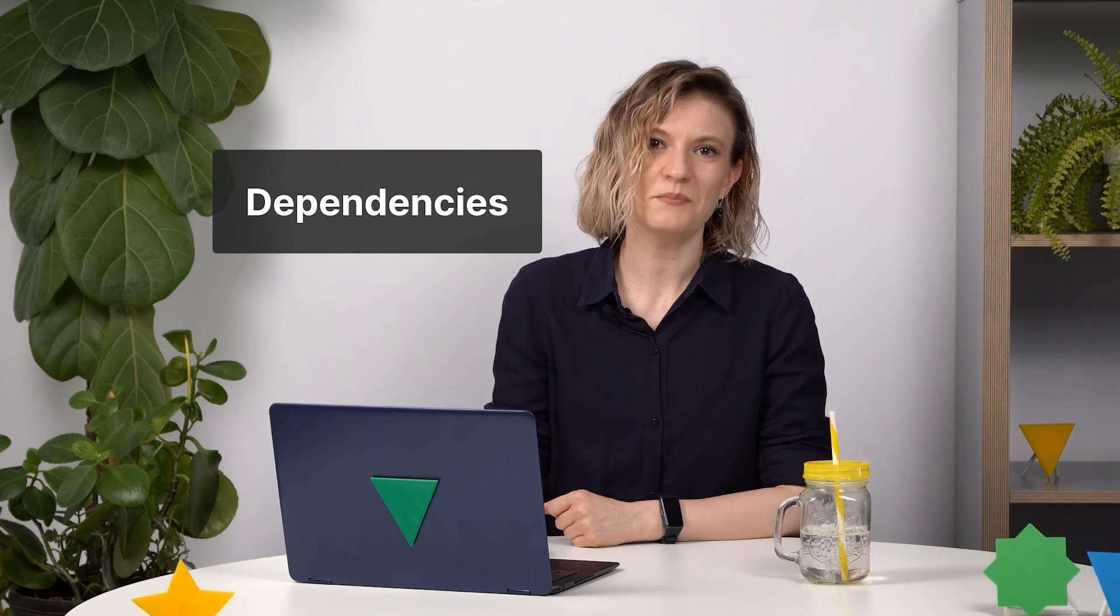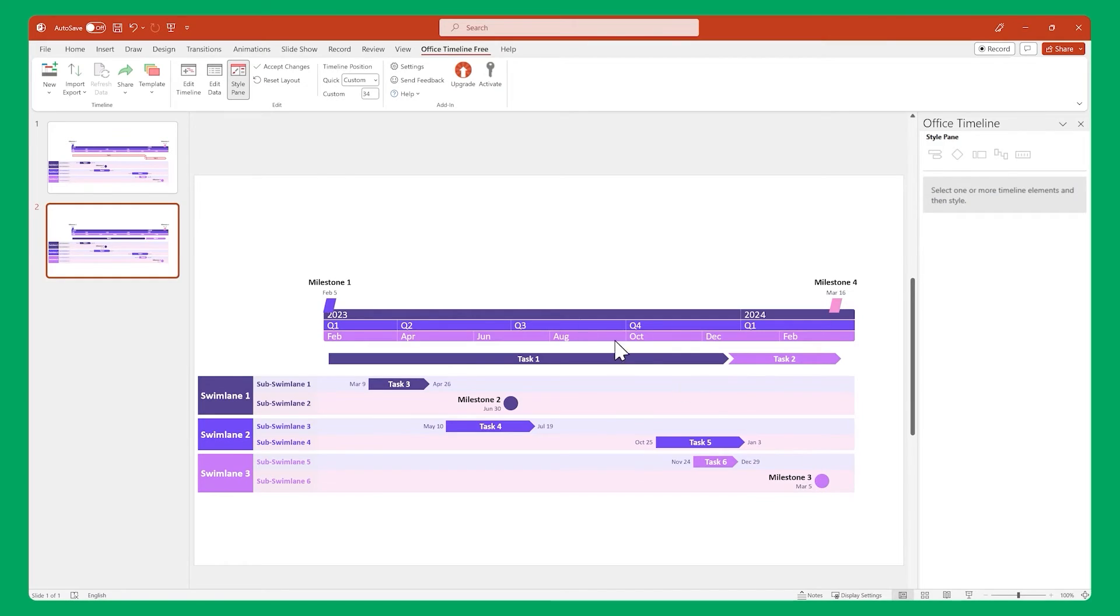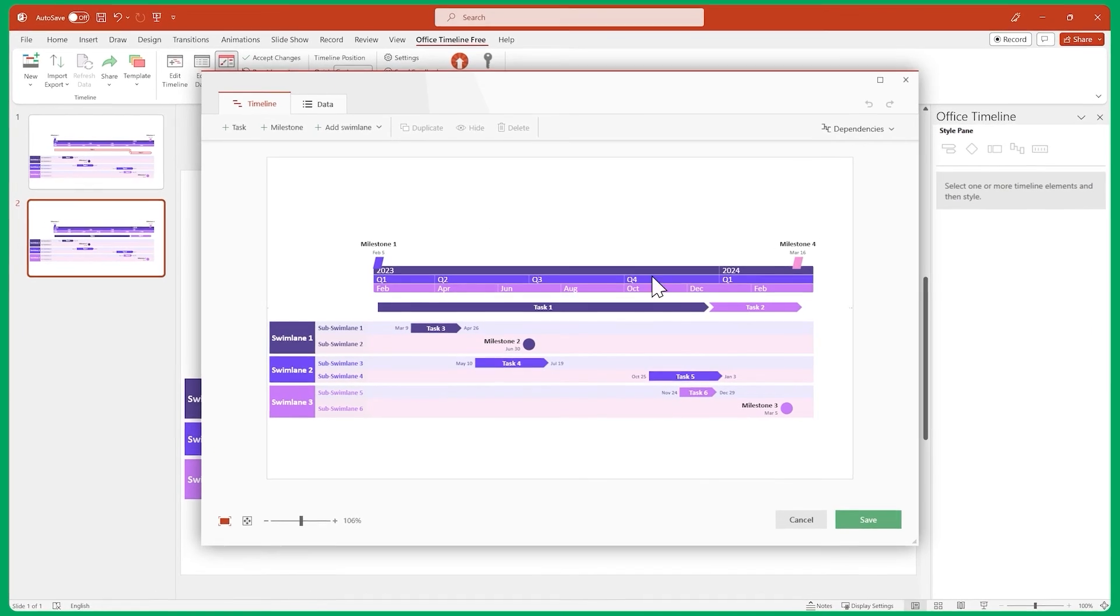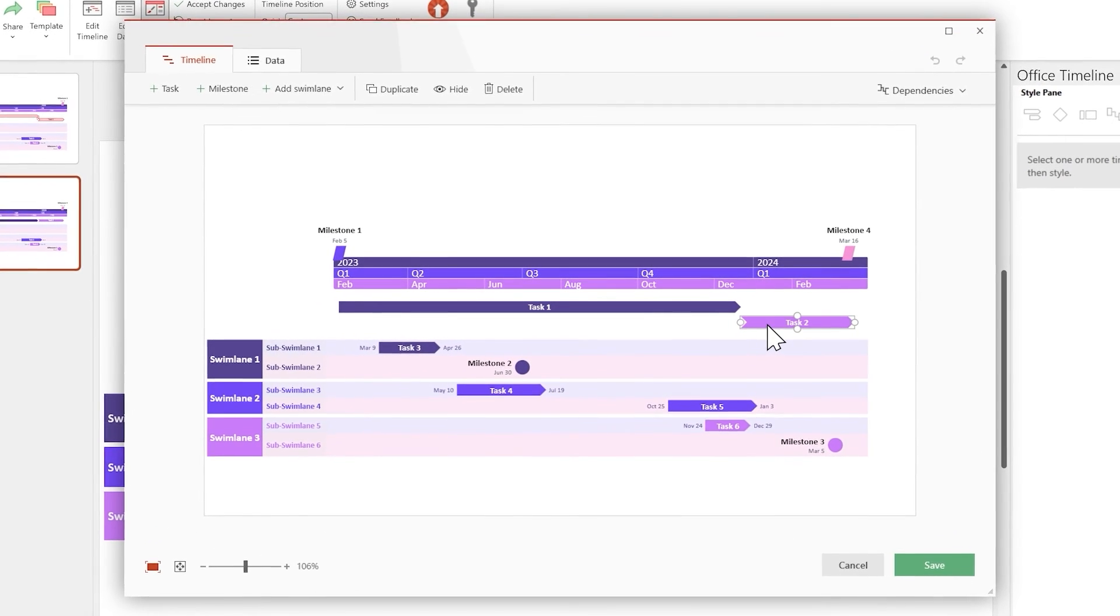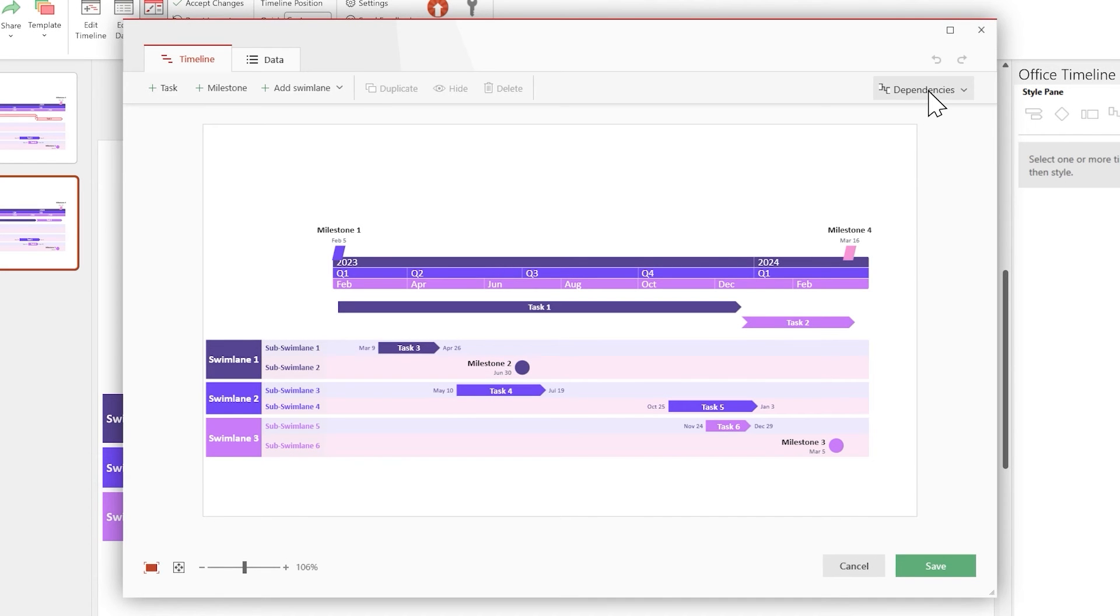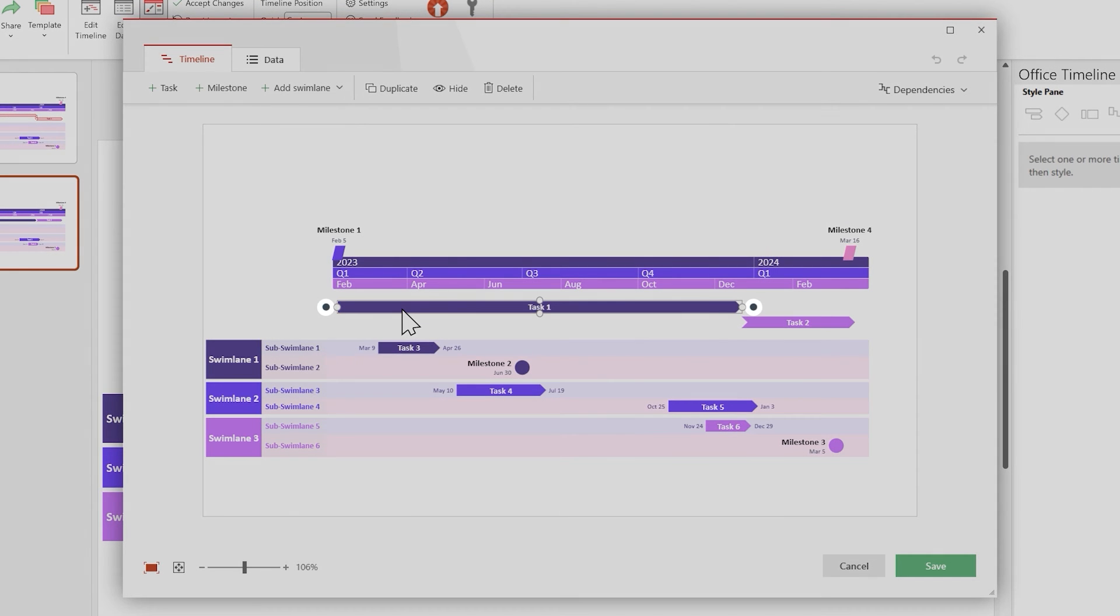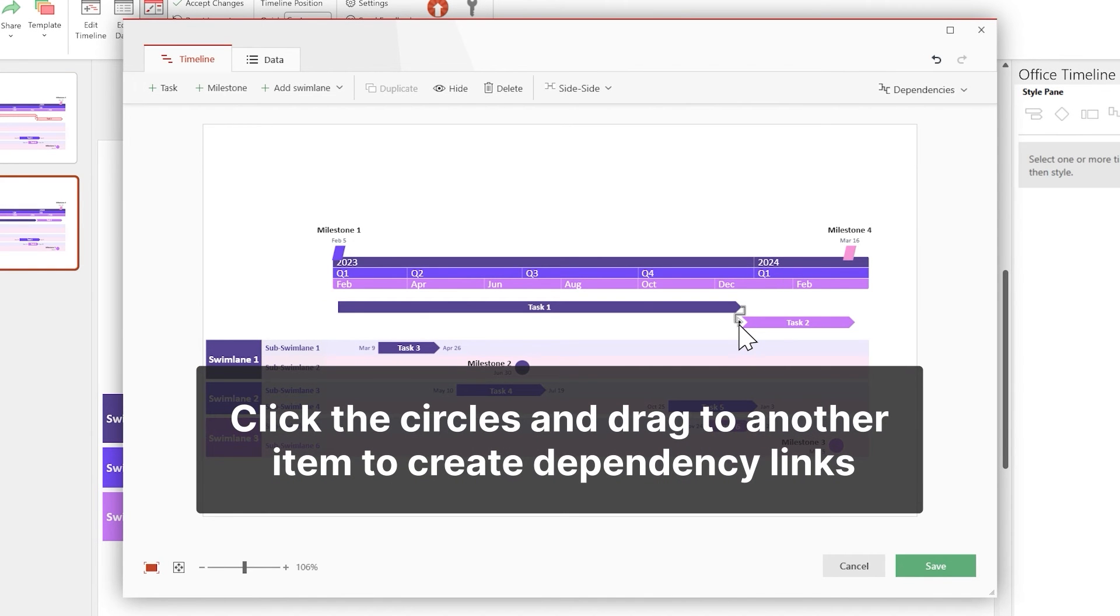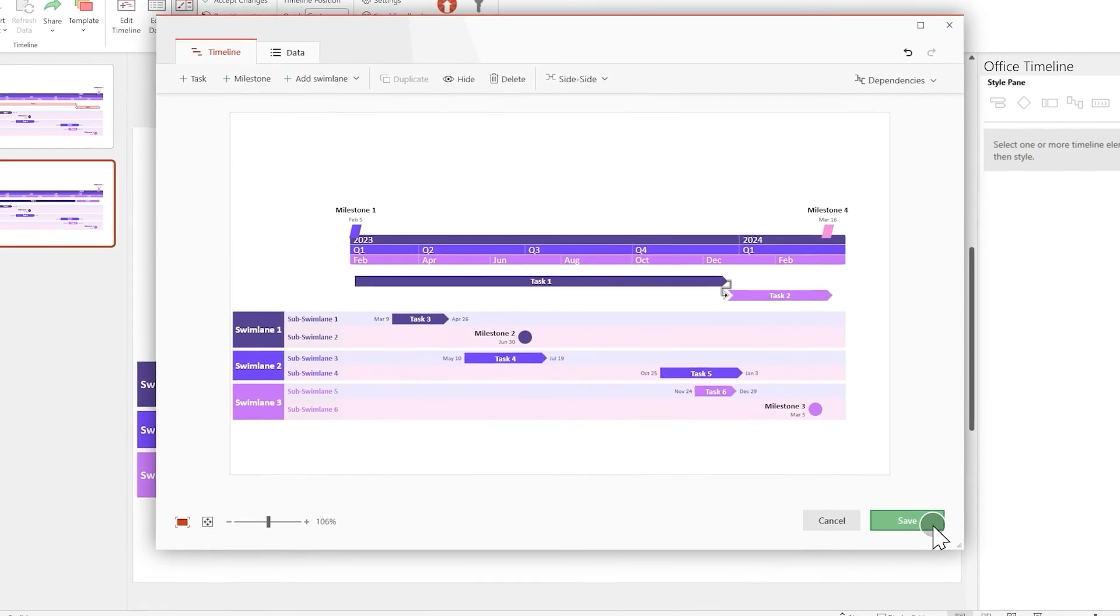In the timeline view, let's rearrange these tasks to make room for our dependency links. Once that is done, look in the upper right part of the window and click on the dependencies rollout, then enable dependencies. Now, if you select a task or milestone, you'll see two dark circles. You can click on any of them and drag to another task or milestone to link them together. Once you're done creating all the connections, click on Save.